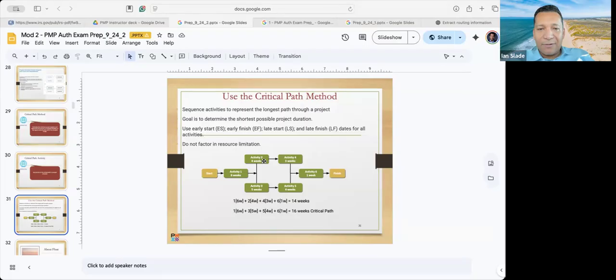That's why they're waiting. That's why there's a slack here. But let's say that what Kelly is doing, she's working on dashboard number 1 and Lizette's working on dashboard number 2. They're not related whatsoever. They're part of the same project, but there's no correlation. They can do their own thing. Then absolutely, Kelly is done with activity 2, and let's say Kelly's also assigned to activity 4.